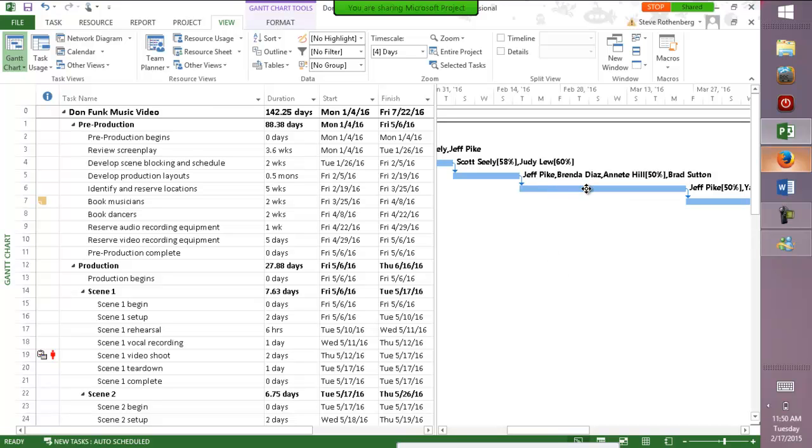Okay, so now how do we split it? Why would we split a task? The reason why you might split a task is if somebody is working on a task and you need that person for a more important task, you need to pull them off, and you tell them, well, you just finish. You'll get back to your task when you finish this one. So now they've got to stop what they're doing.